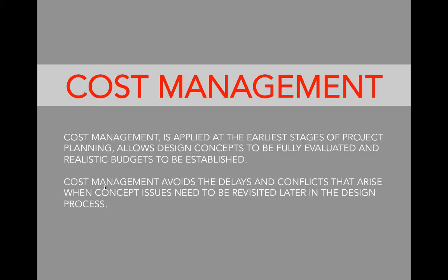And this all comes to cost management, right from the beginning. So with a gross up at a minimum for storage like that, it's all of a sudden 1.4. So you're looking at close to 750,000 square feet for $117 million. So the budget's just collapsed. And a significant portion of that budget will go to the labs, which will take up quite a bit. Standing there in this briefing session, making these calculations, we came to the conclusion the budget's too low. It has to be too low, because your budget is like $150 a square foot, and it includes systems to store all the collections, lab systems, backup systems, extra circulation spaces for those things.